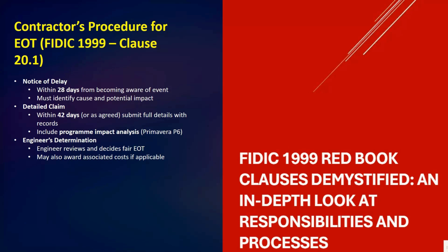So third, we have the engineer's determination. The engineer reviews the claim, checks the facts and schedule, and gives a fair determination of the EOT. If justified, the engineer may also approve additional cost. So this structured process ensures transparency and fairness, but it also demands that the contractor stays organized and timely.